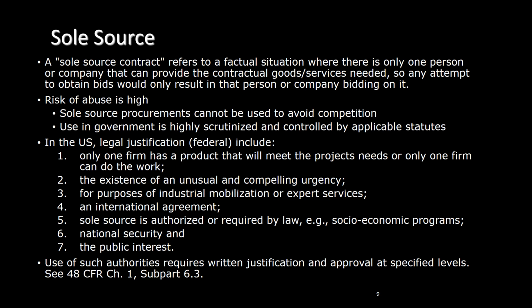A compelling sole source request justification makes a clear and convincing link between the program requirements and why the sole source is the only vendor or contractor capable of meeting those requirements. Simple statements regarding compatibility or other ambiguous reasoning may result in increased time to approve a sole source request.